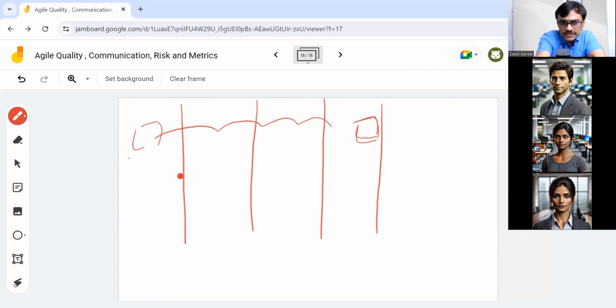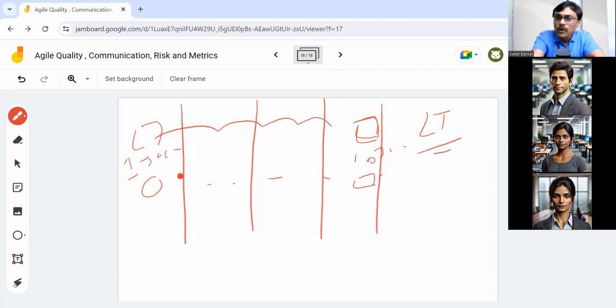You started on 1st of July. You finished on 10th of July. This item got added on the 1st and got finished on the 10th. So it took 10 days to finish it. That's the lead time. Simple. For any item passing through your stages and finishing, it is how long it took to pass through.